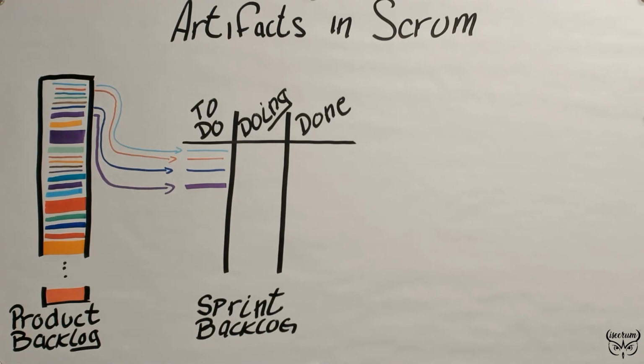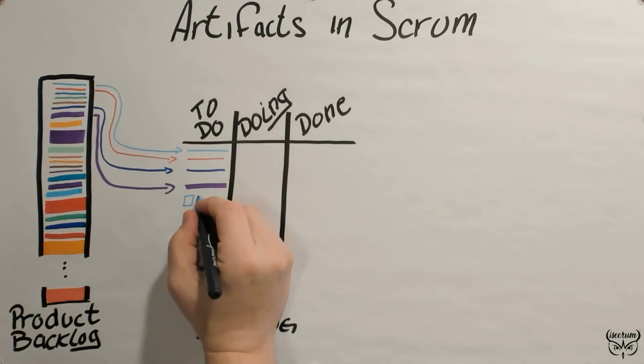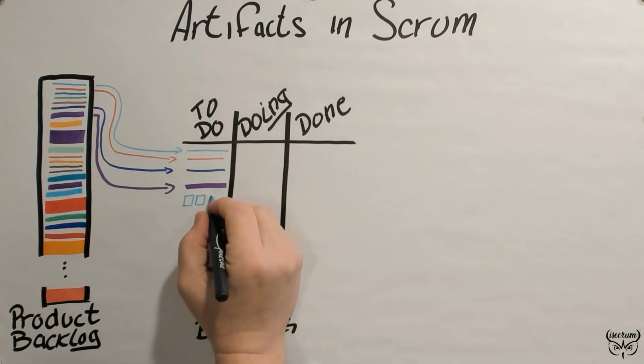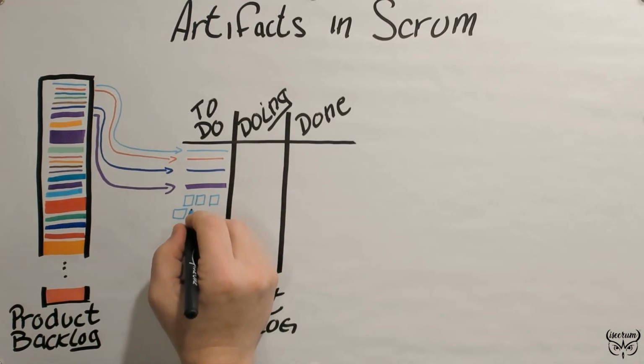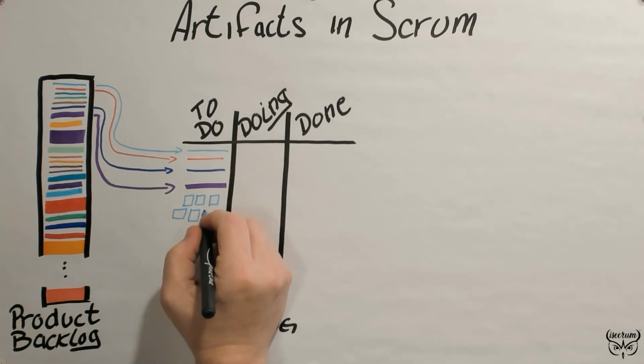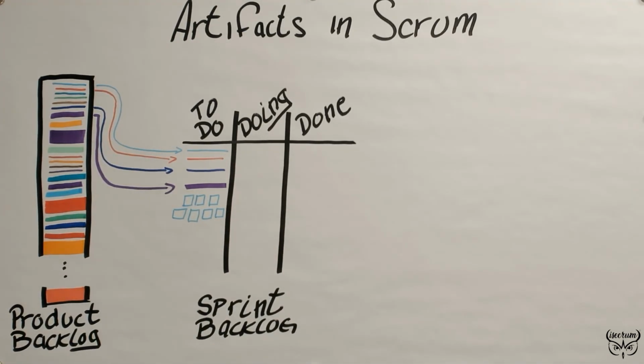Once that's been settled, the developers work on identifying the tasks that are needed to accomplish the product backlog items. These are the little squares. The blue product backlog item ends up with 7 tasks. This is sort of a how-to guide of getting the blue item done.